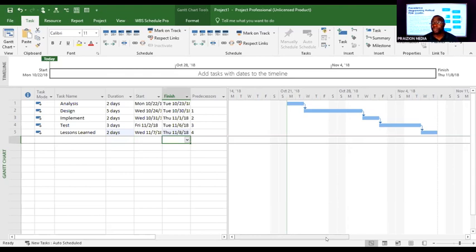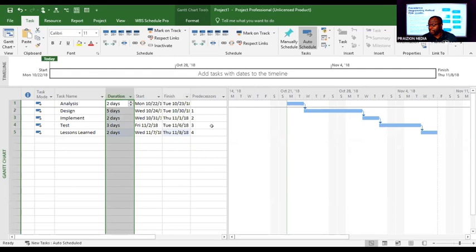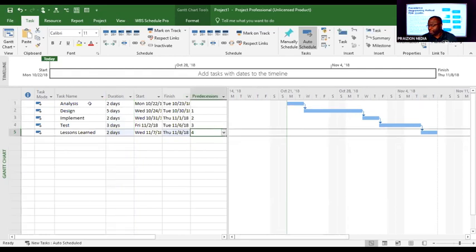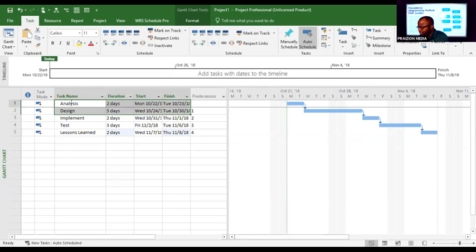If you're going to do this in the real world, what do you need? You need an ERP solution with maybe some historical information that will tell you how long it took people in the past to carry out certain functions. You will then bake all of this in, take a look at their skill level, so on and so forth, where this is going to take place, the location of the performance, and ultimately you will come out with a solid duration. And the next thing is your schedule. Your schedule is not the Gantt chart, but your schedule is this information that we have here. That is pretty much your schedule. So develop schedule is coming out with your coherent schedule that people understand.